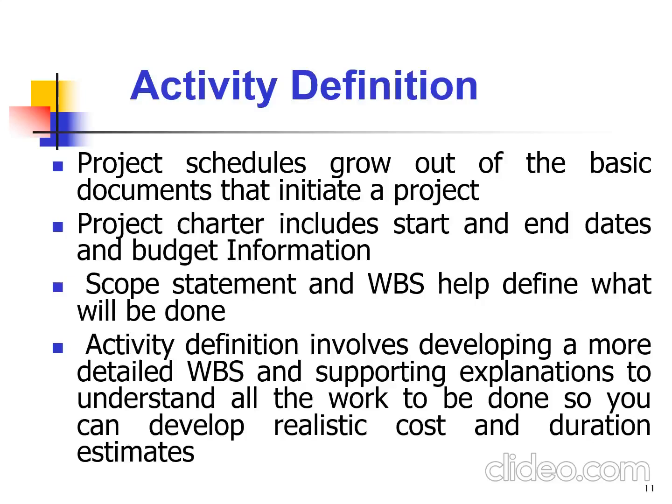Then, activity definition involves developing a more detailed work breakdown structure and supporting explanation to understand all the work to be done so that you can develop realistic cost and duration estimates.